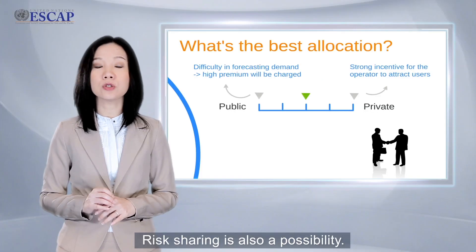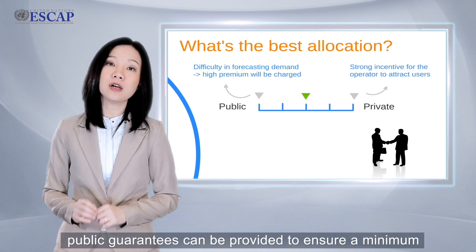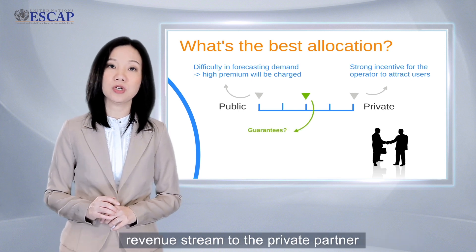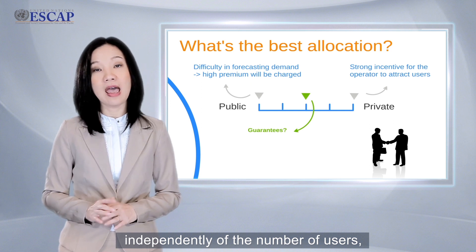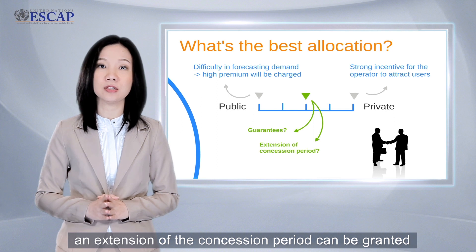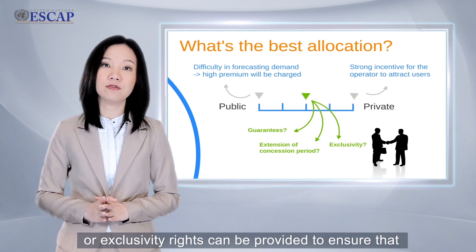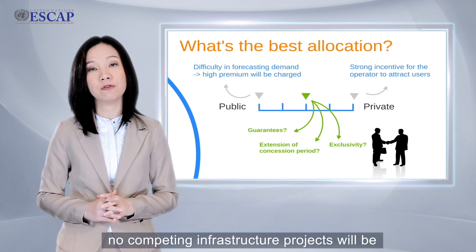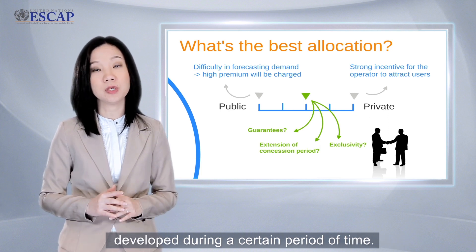Risk sharing is also a possibility. For example, public guarantees can be provided to ensure a minimum revenue stream to private partners independently of the number of users. An extension of the concession period can be granted to compensate for lower demand. Alternatively, exclusivity rights can be provided to ensure that no competing infrastructure projects will be developed during a certain period of time.